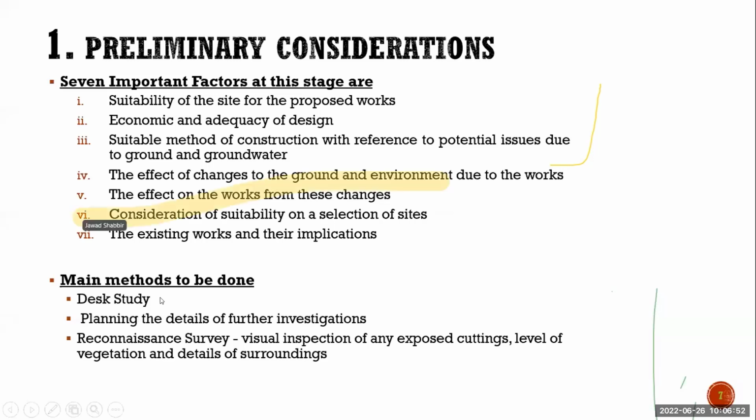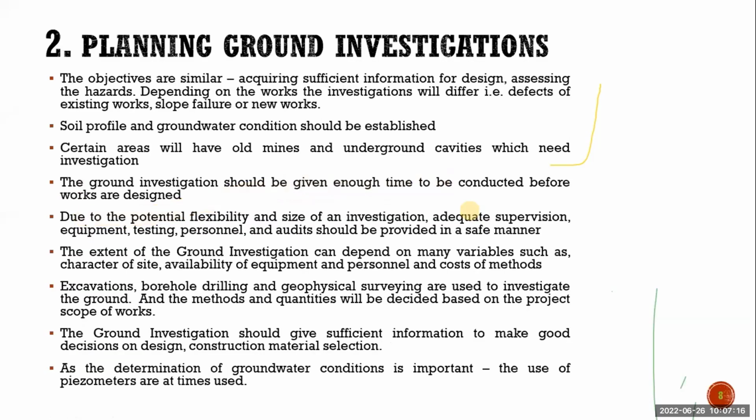We will do the desk study, and we will do the planning of the details of further investigations and reconnaissance survey. Regarding the desk study and the reconnaissance survey, we have already talked about it. And based on these two, we will determine what will be the further investigation required. That we will determine.